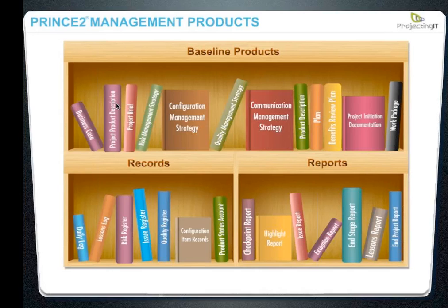For example, in the software world, you have a requirements specification document or business requirements, which are very high level information about business needs and requirements. That's the project product description, the high level scope of the project and project acceptance criteria. And then the product descriptions are like a functional specification that captures detailed functionality of a specific product of your project. So if I'm doing a website, the project product description is the overall requirement on the website, whereas the product description is about a specific functionality, for example, how the payments work.